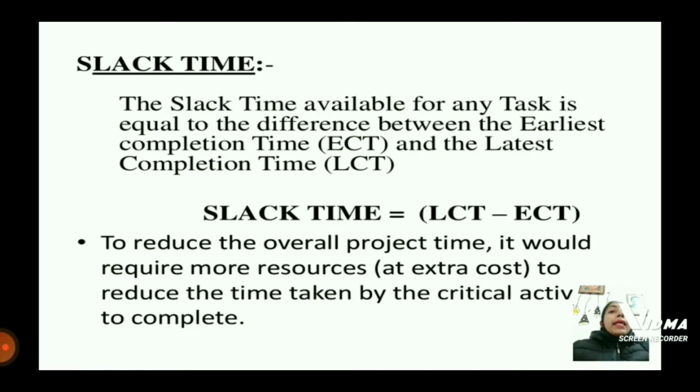Then comes the slack time. The slack time available for any task is equal to the difference between the earliest completion time, ECT, and the latest completion time, LCT. Slack time equals LCT minus ECT. To reduce the overall project time, it would require more resources at extra cost to reduce the time taken by the critical activity to complete.